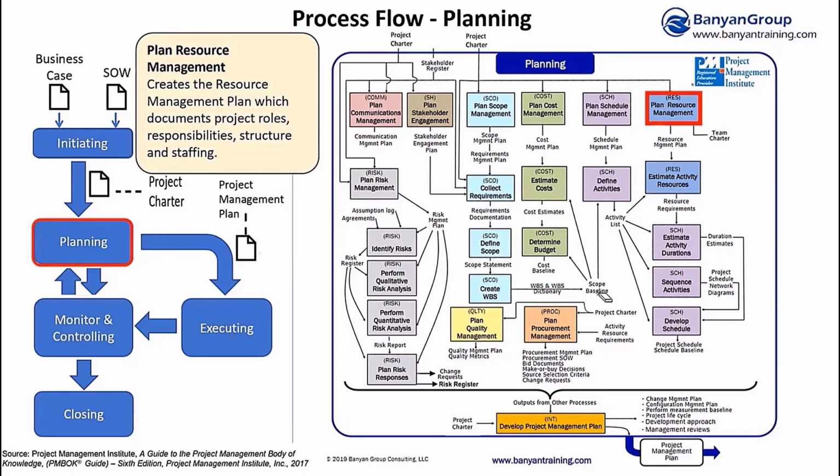And before we can go to the next schedule management process, we have to understand what our resource requirements are. So you can see this next process here is estimate activity durations, but we can't estimate activity durations, right? We have our activities at this point. We can't estimate the activity durations because we have to first understand what our resources are on the activities.